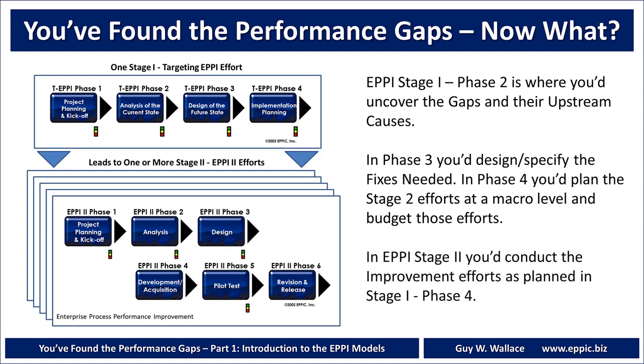This is a typical ADDIE-like model: project planning and kickoff on the front, analysis, more detailed analysis than you did in stage one, more detailed design than you did in stage one, now because you know you're really going to be addressing it. Then you're going to develop and implement the solution or solution set. Then you're going to pilot test that to make sure it works before you do a general revision and release.